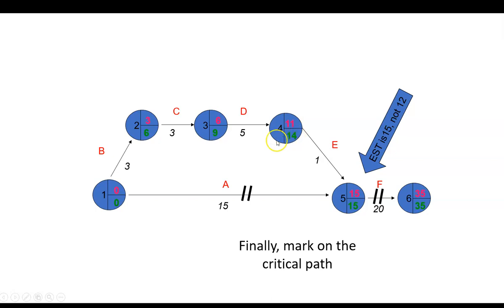And the same here, we have to start at 6, but we don't have to finish until 9 weeks in order to keep all of the rest of this channel on track. Because we can see that 9 plus 5 would be 14, and 14 plus 1 would be 15, so we'd catch up.